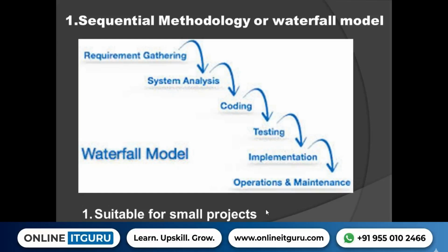If the review says that it is okay, we can go for the second phase, then we will start the second phase. If there is anything negative in the review, then we will think whether to continue the project or whether to stop the project. So once we start the second phase, again we are going to complete it, and after the second phase, again we are going to have a review.